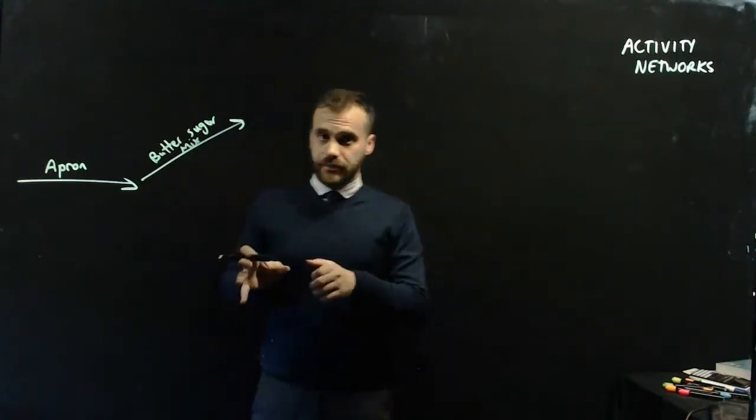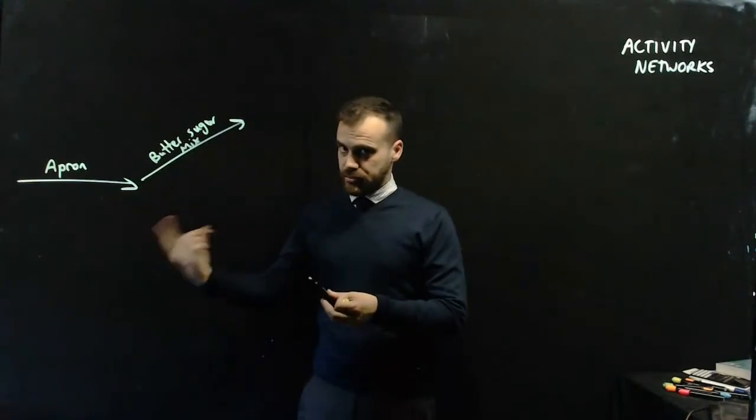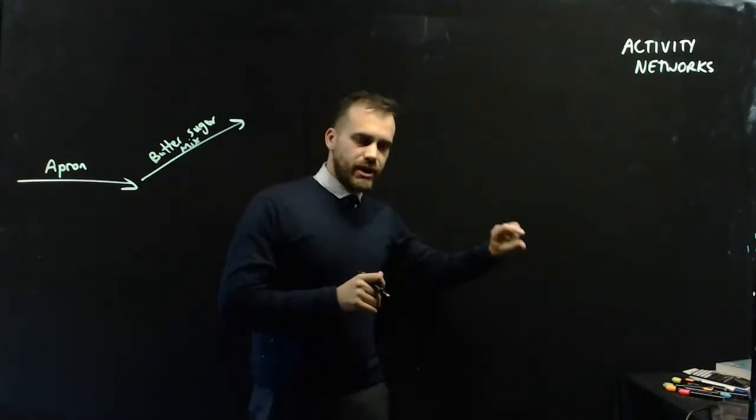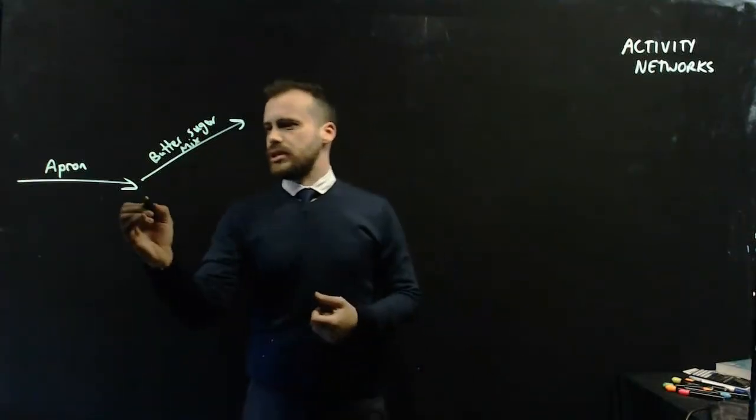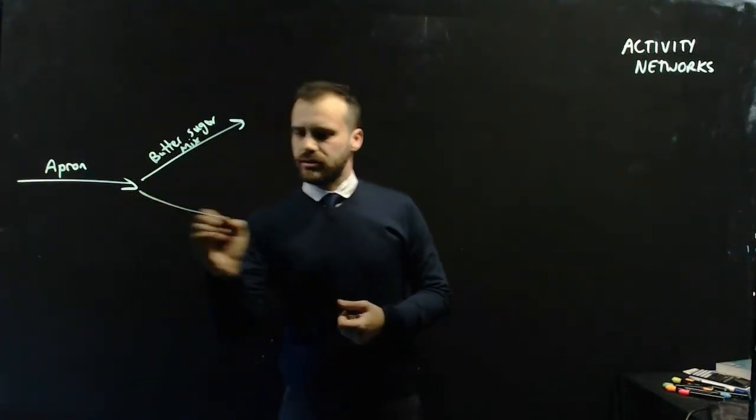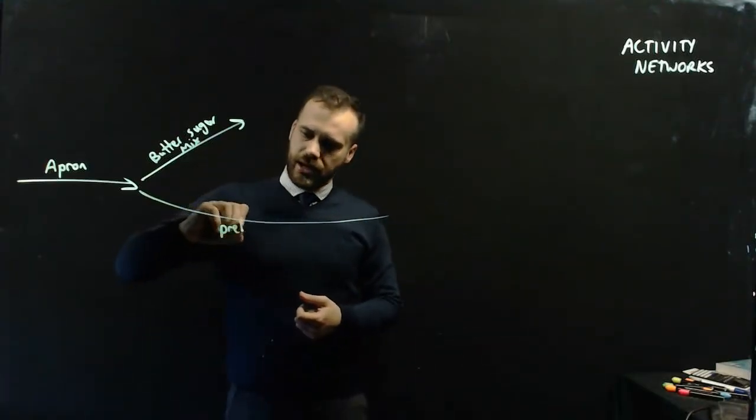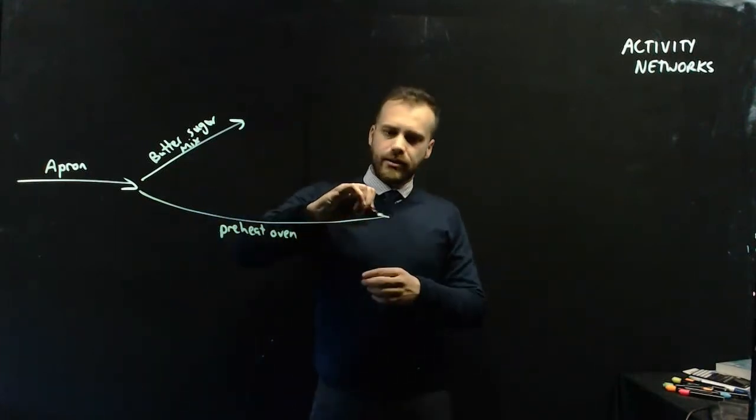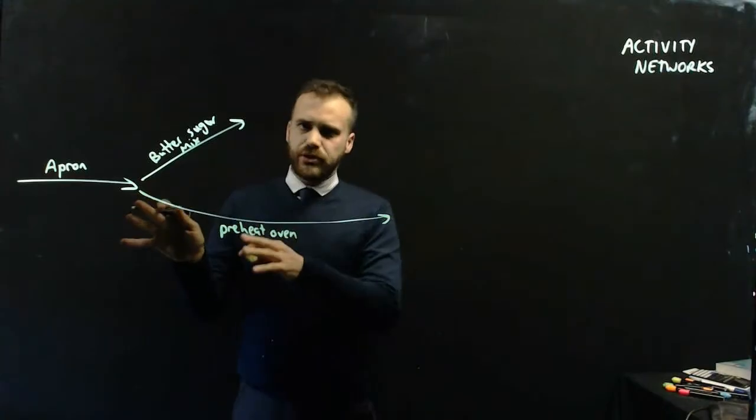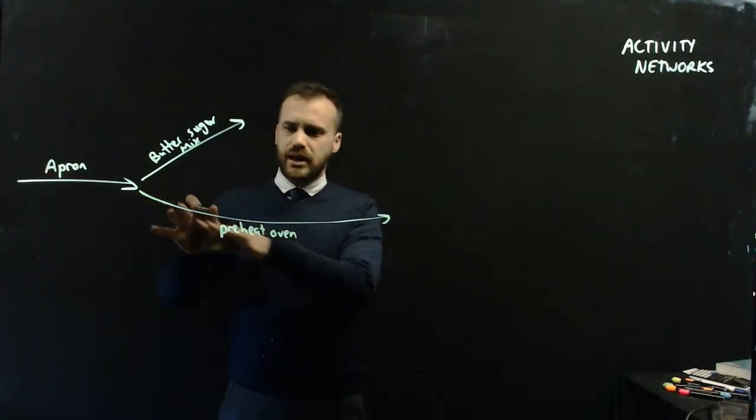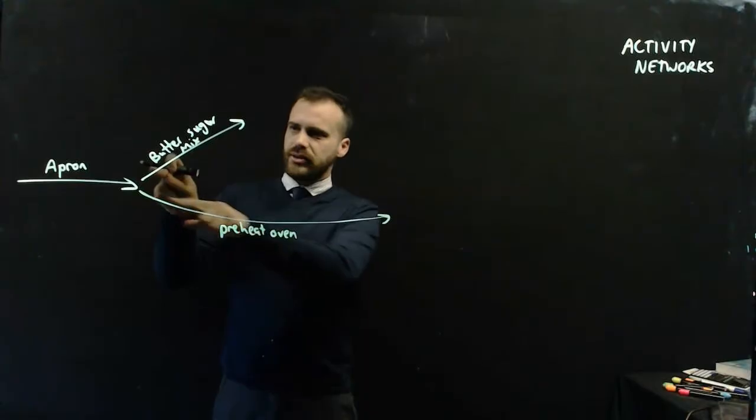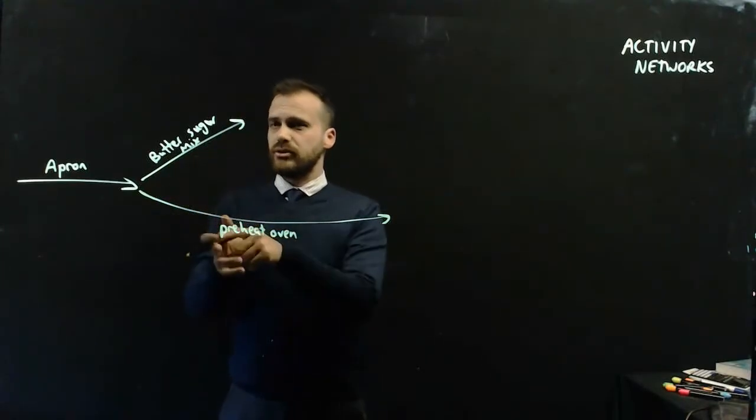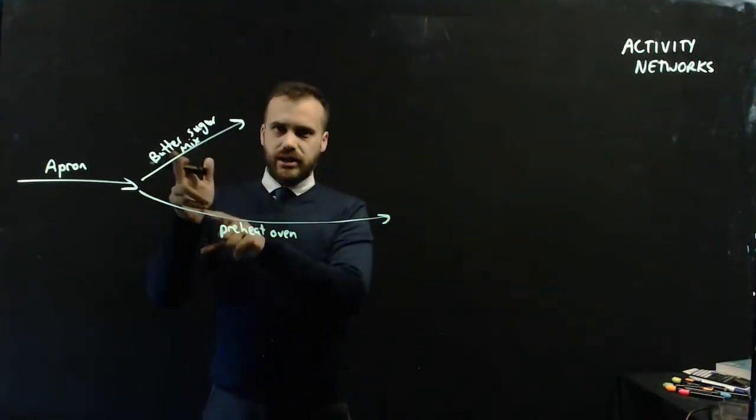Now while that's happening, I put it in my machine and it's mixing. I'm thinking because I like to move fast. The other thing I need to do is make sure that I turn the oven on, because an oven needs to preheat. Once I have my apron on, I can start the butter and sugar mixing, and I can turn on the oven. They don't really depend on each other.